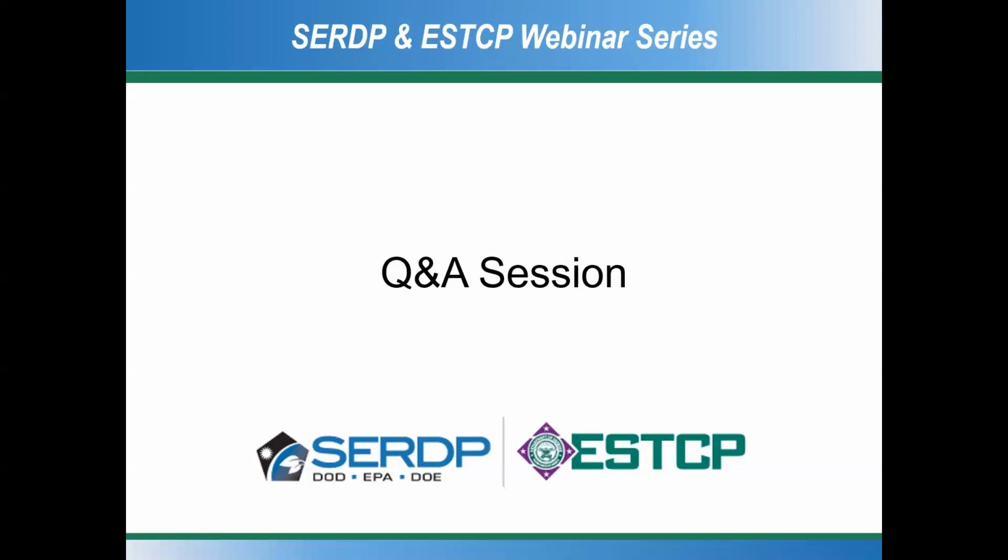The way the system's operating right now, just off the frequency regulation, it's a bit longer than that, and that's going to be in the final report. I don't remember what the specific number is, but for a system like this, getting to 5-year simple payback, which is the original goal, is pretty difficult. Getting to a 10-year simple payback, I think, is definitely in the range of achievable. So that's the kind of payback period you're looking at with this type of system.